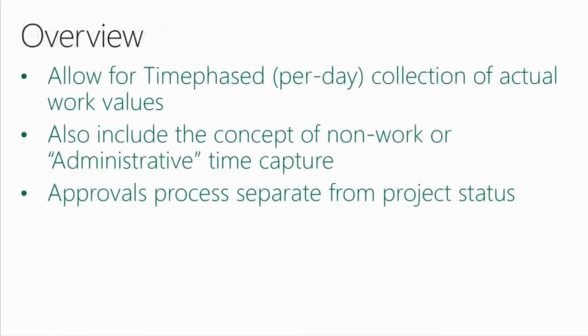So if any data was already entered in the task grid, this would get overwritten. So if you went that route, any previously entered data would get overwritten by this. Since the actual work spent on a task in the task progress may vary, and it may not progress at an even pace, and sometimes a task may take more or less time than what was anticipated, we've intentionally not synchronized both these sets of data.